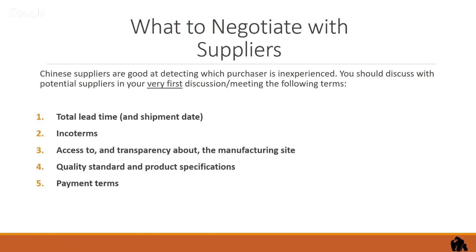They came back with a pretty good breakdown of that. Once we've received the deposit, it's going to be X amount of days. And bearing in mind the time of year, there could be delays in shipping because it's very busy, as it's Christmas. So I got a definitive answer: between 14 and 20 days from the time they receive the deposit until my product is in at FBA.